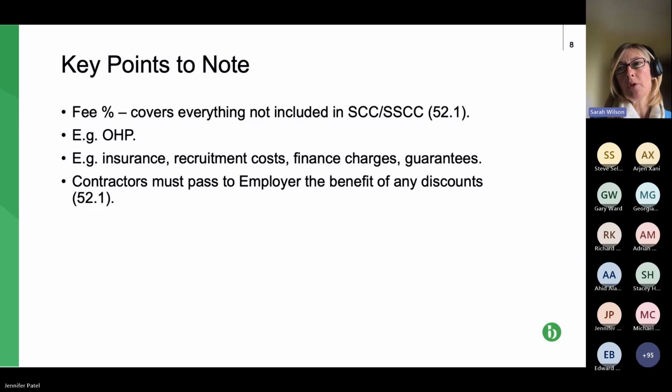So the actual cost of the people, the actual cost of the equipment being used, the actual cost of the materials. So you get that base cost so that the contractor isn't out of pocket, but equally hasn't made any money. And then the fee percentage is what covers that overhead and profit, and those are the miscellaneous amounts.